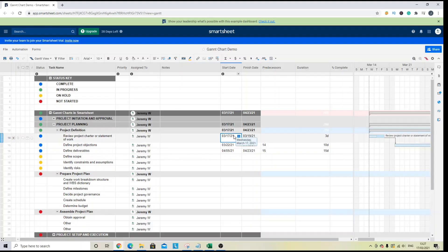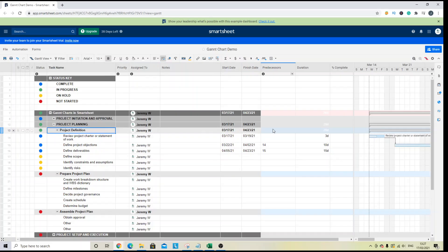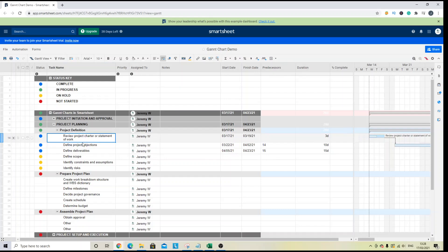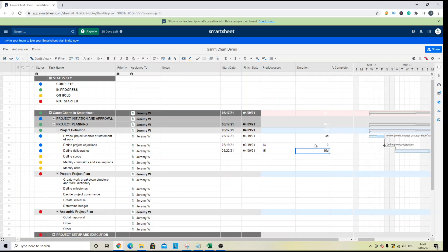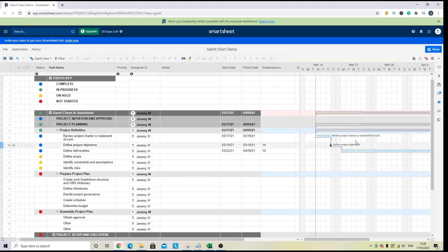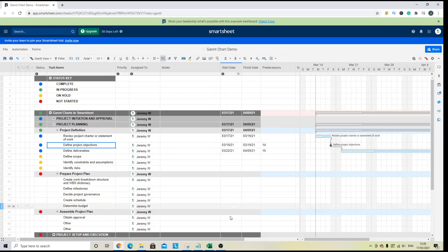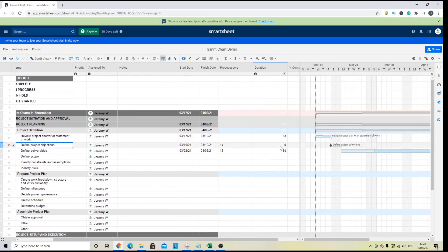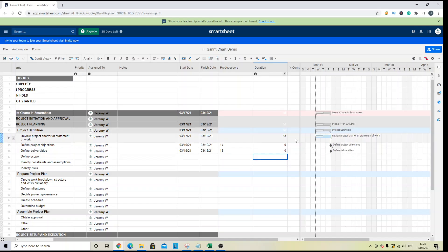Now, to set this up as a milestone, if you wanted to change a subtask to be a milestone, you can enter zero in duration. And you will see that reflected in the Gantt chart. So that is a milestone. So any milestone that you want to have, just put zero in duration. So we have two major milestones there.